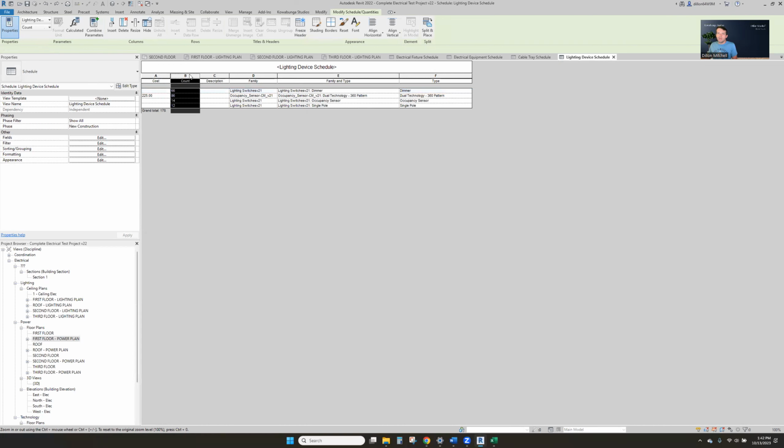You know, this is a column that we would never show on a design bid build because we don't want to be responsible for that count. But for other projects and especially design build, you know, you want to be able to show that count. So that's why we do it here.